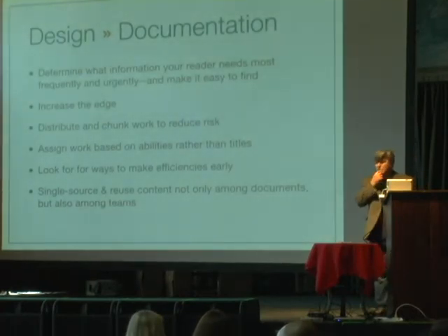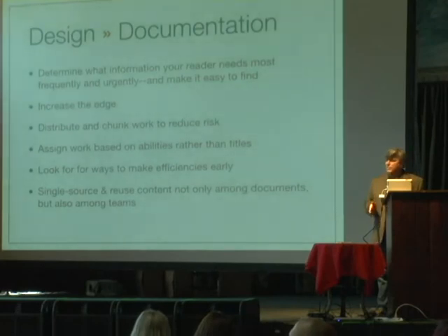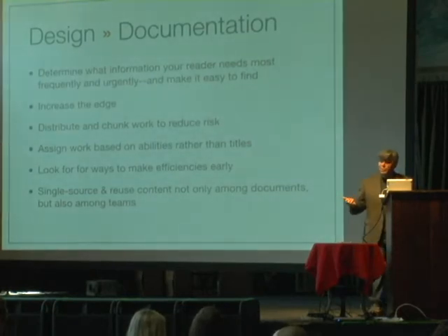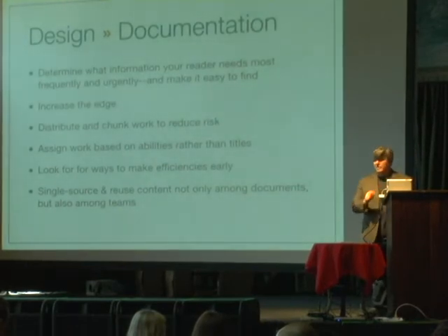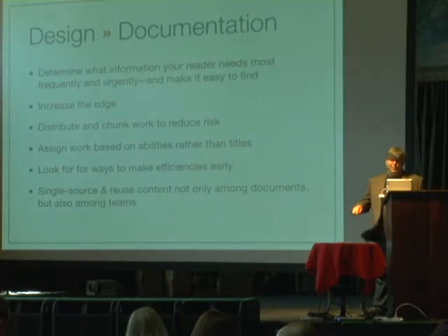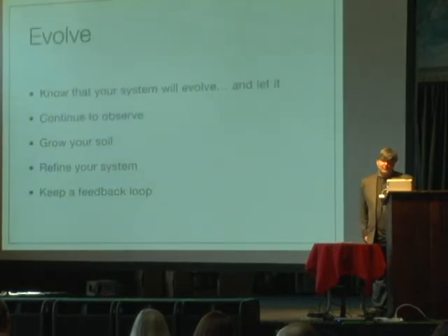We used XML. We used MadCap Flare, and we single sourced our stuff. After the initial analysis, the project owners went out and created the structure for the whole project, and then we were able to just assign work. So if one person was really fast in that area or hit a roadblock, they could just jump over and help the other. We were able to produce our products in well under the time frame that we were given. It was a very efficient and happy way to work.